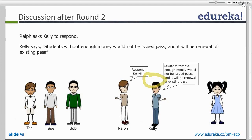Since there are no more questions, Ralph calls for a second round of voting. This time Bob says 3, Sue says 5, and Ted says 8 — the numbers have completely flipped. Ralph again questions Ted and Bob. Bob says Ted was right last time — it's simple, just 30 days instead of 365 days, so it's straightforward. But Ted says Bob was right originally — there is a renewal happening and the ID needs to be verified, so it is complex and should be 8.